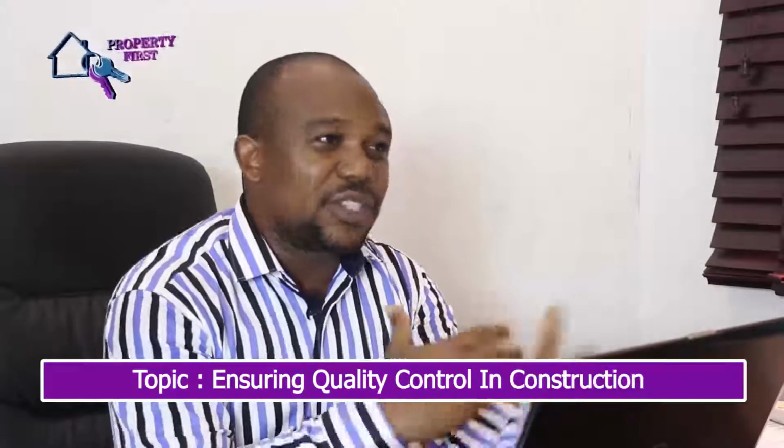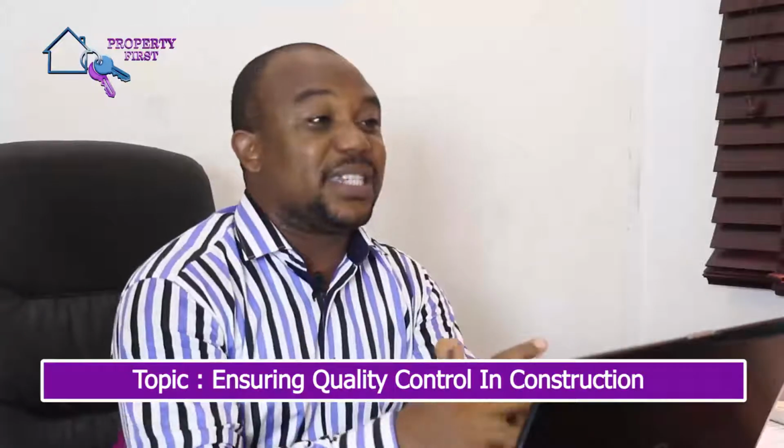Most times we always advise our clients, if it's a residential apartment for an individual, not an elaborate project, I will always advise a client to go for a fixed contract in order to avoid any form of variation. When I say a fixed contract, a contract that the price of items remain constant, nothing shifts the price, only if the quantity increases. That's a fixed contract.